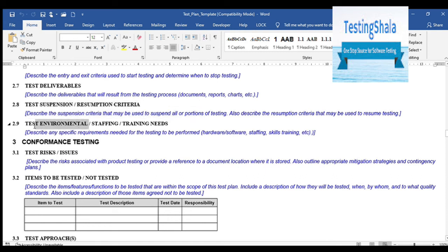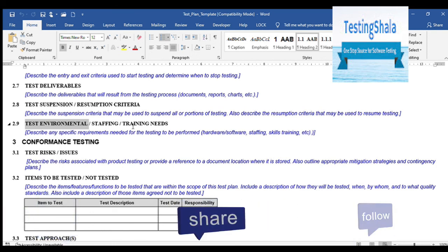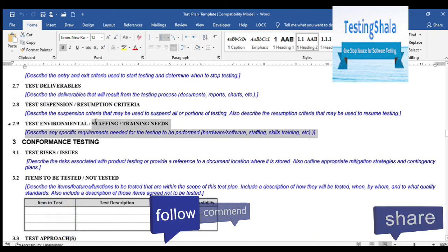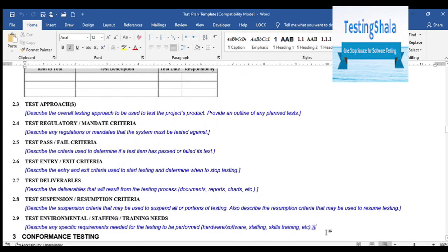Test environment and staffing needs — before a project gets started you should assess what environments are required for testing. Every detail should be called out: hardware like desktops or mobile devices, software requirements. With respect to staffing, you document how much staff is required, what levels are needed, who is already identified, whether any training is recommended for staff who are lacking in certain areas, and what skills are required — all documented transparently.